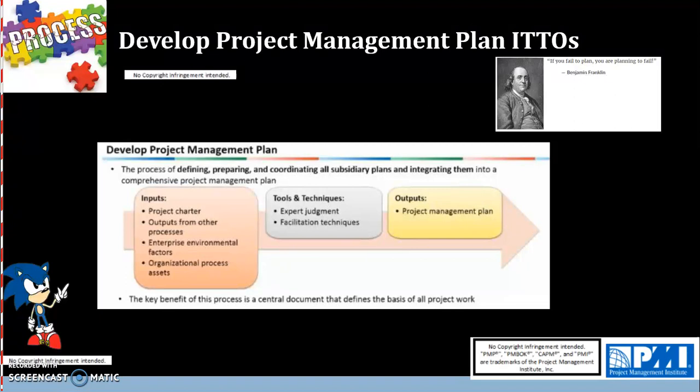This is now going to serve as the playbook for the project team for the rest of the project. Reason being, it contains all the plans and baselines that must be met throughout the project. Any changes to the original plan, specifically the baselines, will need a change request and feeds into the perform integrated change control process for approval or rejection by the change control board.